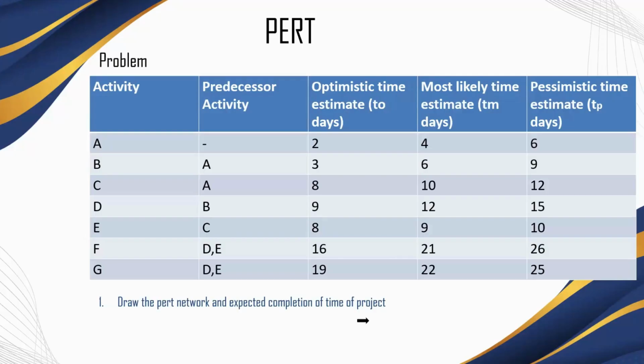There will be some dummy activities as well. When two or more parallel activities in a project have the same head and tail events, they are connected with more than one arrow. When two chains of activity have a common event, yet are wholly or partly independent of each other, a dummy activity is used in such a case to establish the proper logical relationship. It is also known as a logic dummy activity.